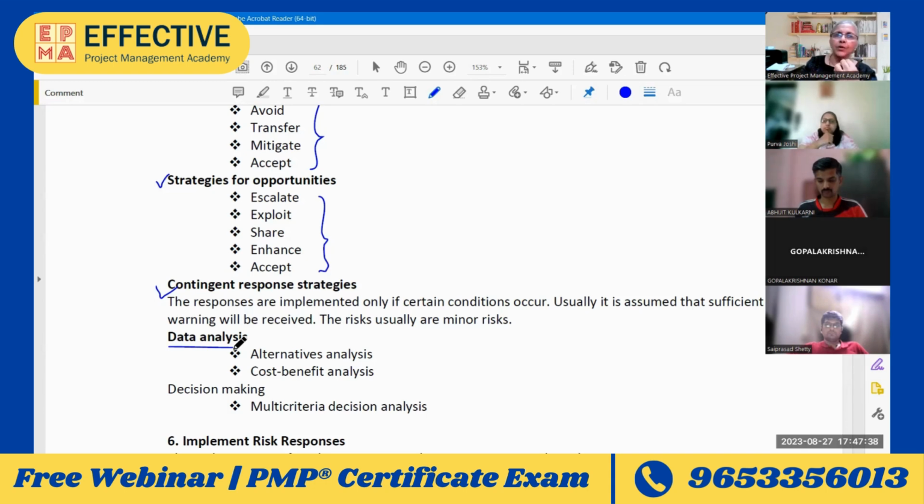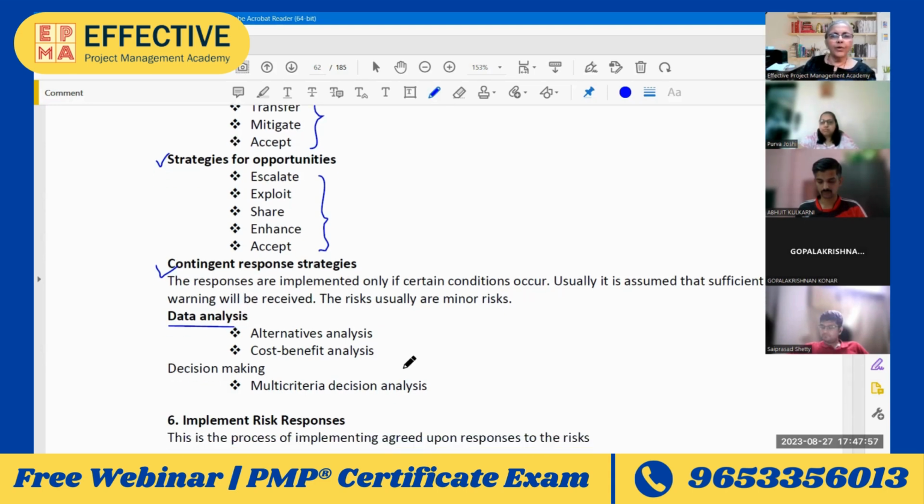I'm adding two resources so that activity A can be done faster. Is it really worth it? If for compressing the activity, I'm spending 10,000 rupees, is that really worth it? The benefits that I get, are they really worth it? That's what we are trying to find out. Cost benefit analysis. Depending on what the analysis tells us, we will take a decision. Shall we compress activity A? Shall we add two resources? Shall we add three resources? The decision is taken here.